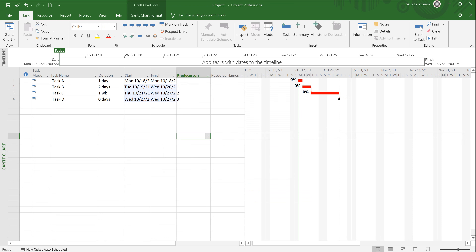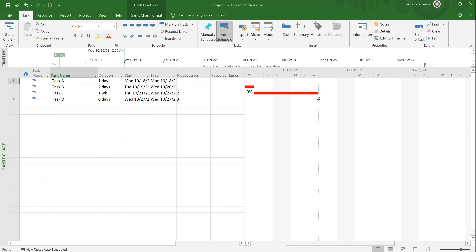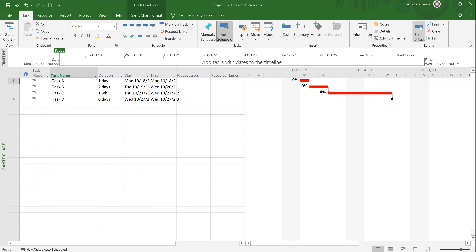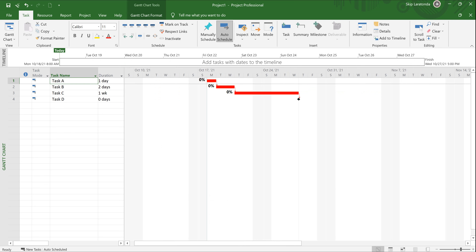Notice it now shows the critical path. I can zoom in at the bottom left-hand corner, click on Task A, and rather than positioning with the horizontal scroll bar, I can go up to Scroll to Task and it puts Task A right in the middle of the screen. Notice that all these tasks are critical — the critical path consists of Task A, Task B, Task C, and Task D. Because they're all tied with a finish-to-start relationship, that makes them all critical.